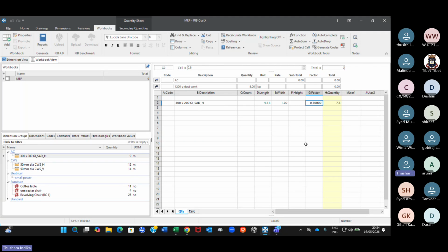and also the measurement rule. If you are measuring according to the principle of measurement for me, then of course it has to be kg. I can't remember what SLS 573 says about ductwork. Maybe square meters, maybe kilograms. There can be many deviations. So that is how you measure your ductwork.